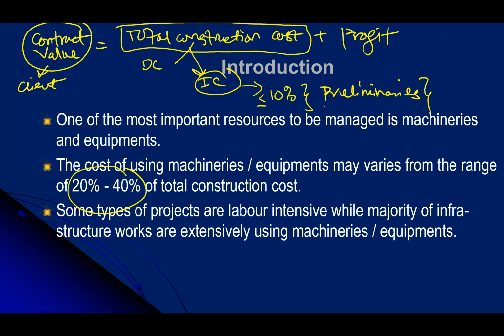Okay, you can Google. Maybe perhaps you have learned in your construction technology and estimating class some of the items that we call preliminary, including all utility bills, contractor sign office, etc. The cost in terms of managing the project itself. But in terms of the real cost, in order to construct things being asked in the contract document, this is direct cost. Normally, man, machine, and material could be amounting 90%. So the majority of the cost would be going to the material, manpower, and machinery.